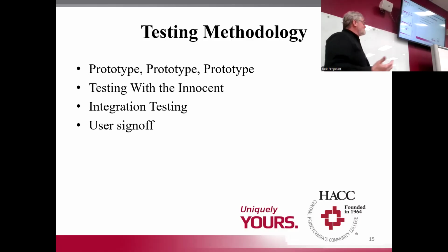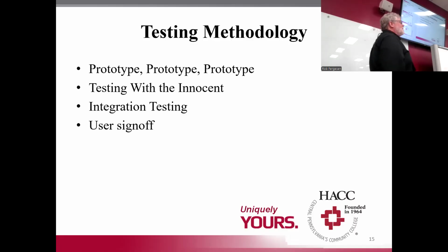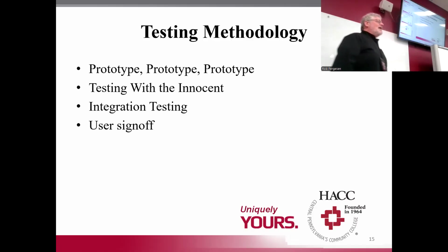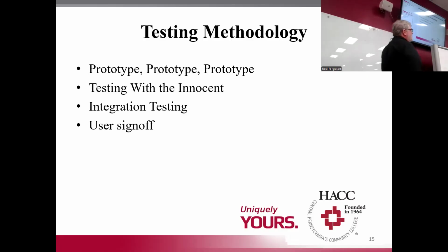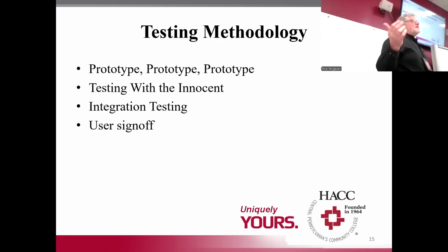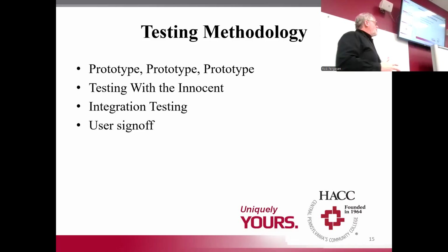So you've got to test it. I say testing with the innocent, right? Test it with the operators. Test it with the people who didn't design the HMI, the people who don't know what you're doing and therefore may just stumble into the problems that you didn't see because you're too close to the problem. We also have to do integration testing, which is testing my HMI not just with the PLC running one particular machine, but if that PLC is hooked up to other PLCs and other machines, making sure that all of them work together, because sometimes a single HMI could create a problem down the line. Integration means a lot of pieces and parts together.